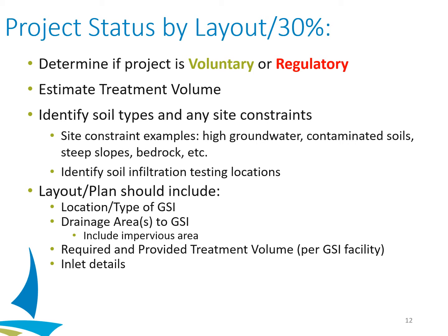If we are a regulatory project that must meet the stormwater ordinance, we should immediately understand our requirements: what our water quality requirements are, what our treatment volume is estimated to be, understand our soil types and major site constraints such as high groundwater, contaminated soils, or bedrock, and start identifying any further testing needed to understand our infiltration rates. By layout, we should already start having GSI or other stormwater management devices located on the plan, understanding their drainage area and how much impervious area is draining to each. We'll want to have a required and provided treatment volume for each GSI facility, and start seeing inlet details and cross sections of the stormwater management used to meet the ordinance.